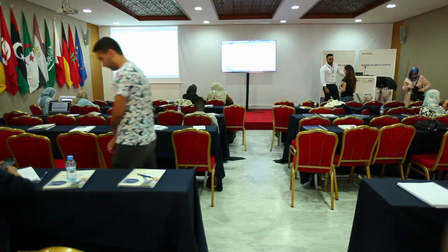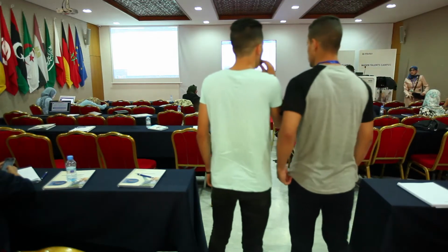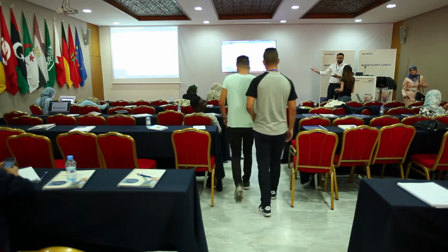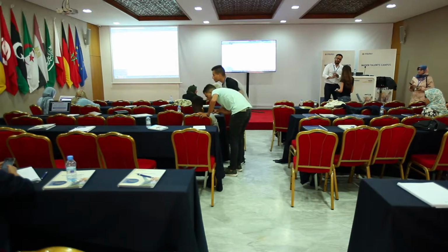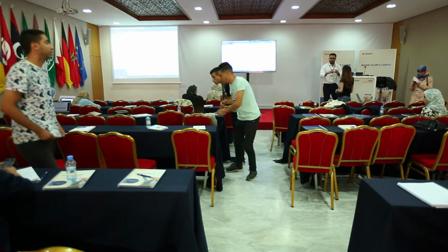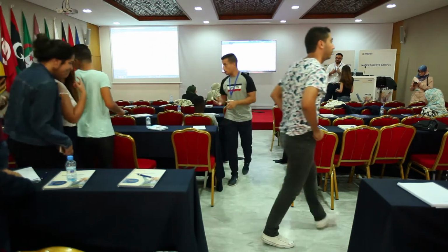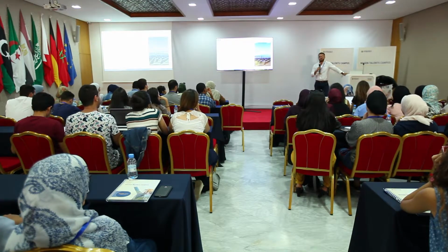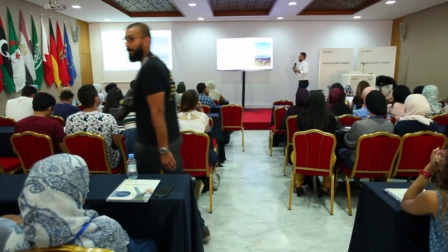Now, after it has been awarded, until June 2013, nothing happened. So you have a year where Aqua Power had to go outside and try to see who is going to put in 500, whatever it would cost, 200 million with them. All this year, it took Aqua Power to get financial closure, which means it's just a day where the Aqua Power boss calls everyone and says, we're in. We finally got all the money we need. And you could imagine, looking at the backgrounds of all of you, you don't need many engineers to do this. This is just mainly finance.